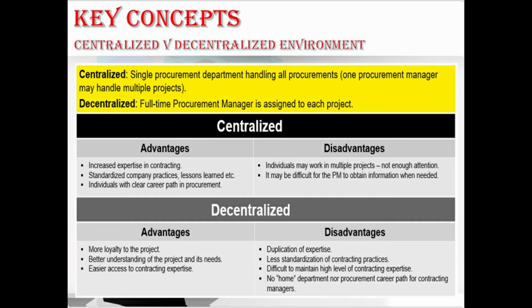Centralized. What is centralized here? The single procurement department handling all the procurements. One procurement manager may handle multiple projects here. That is the centralized concept. And coming to the decentralized, a full-time procurement manager is assigned to each project. Hope you understood about the centralized and decentralized concepts.